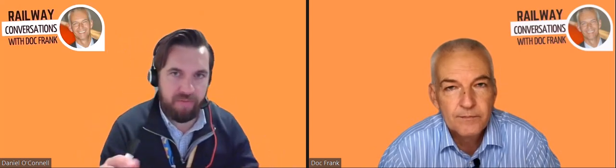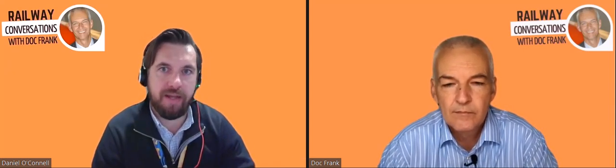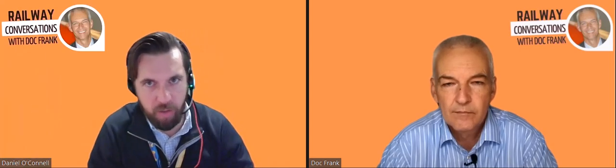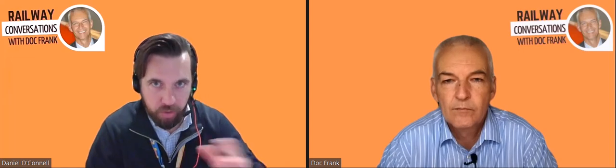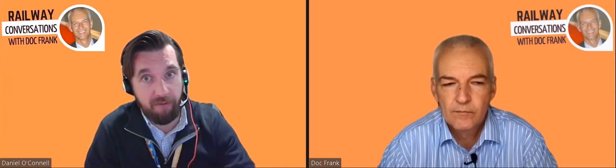I think you're right. It's the variable. So in my mind, there are 2 ways of doing this from a project perspective. If you look at it from a purely PSD part, as I mentioned earlier, that's off-site testing. Let's say you've got trains in a depot, in any country in the world for a new project. If you install an element of a signaling system and an element of a physical platform screen door there, you could pass every train through that as it comes out. So they're type testing every time.